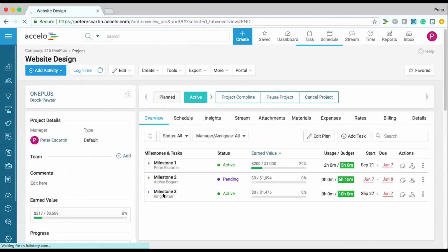From here, we're going to go ahead and transition into our tickets now. Now, tickets by default are time and materials along with staff rates. So when you create a ticket, whoever logs work on that project, or excuse me, the ticket, their staff rate will apply. Now you can update rates on a ticket by editing the budget and the rate, and I'll talk about how we can do that right now.